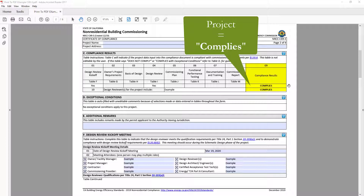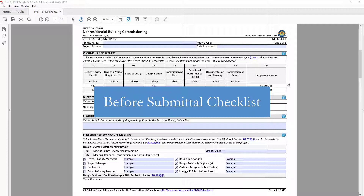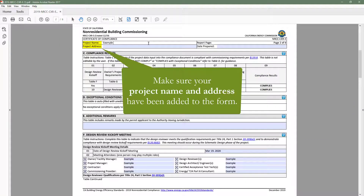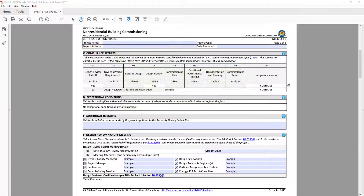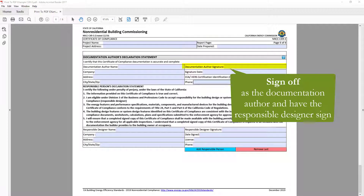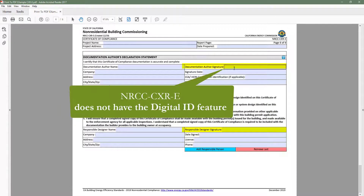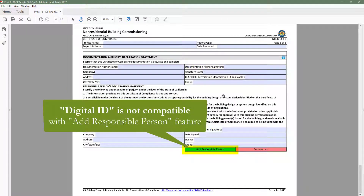Before you add your compliance form to your plan set in order to submit to the local building department, you will want to confirm a few things. One: make sure Table C indicates complies at the project level. Two: make sure your project name and address have been added to the form and are accurate. Three: you will need to sign as the documentation author and also get the responsible designer to sign off. The CXR does not have the Adobe signature feature like some of the other dynamic forms do, because the CXR has the ability to add duplicate signature pages for cases where there are multiple responsible designers.